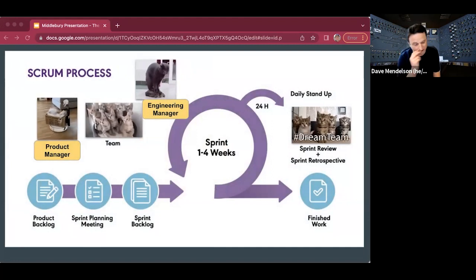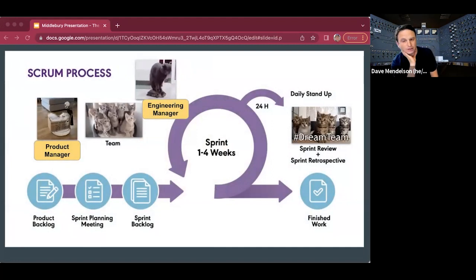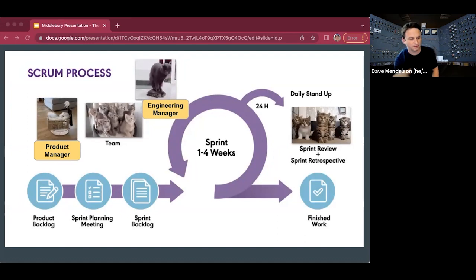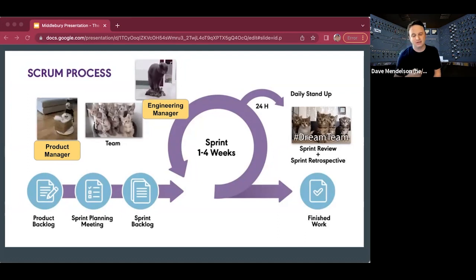So for example, where I currently am, the teams work in 2 week sprints. At the beginning of every sprint, they'll have this backlog of work, really just tickets of work that individual engineers can do, and they refine that down to a list that they're going to propose for this next sprint. The teams meet together, they prioritize that, and then they start getting folks committed to it.